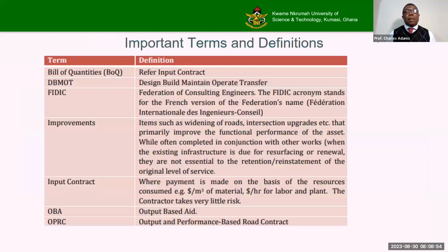So let's look at some important terms and definitions in this presentation. Of course, BOQ, we know a BOQ in a regular contract. Then we talk about DBMOT, design, build, maintain, operate, and transfer. This is a complete asset management solution that is applied in OPRCs. And here, the contracting entity, not contractor, contracting entity, designs, builds, maintains the road, operates it, and then transfers it at the end. So this is a complete asset management solution.